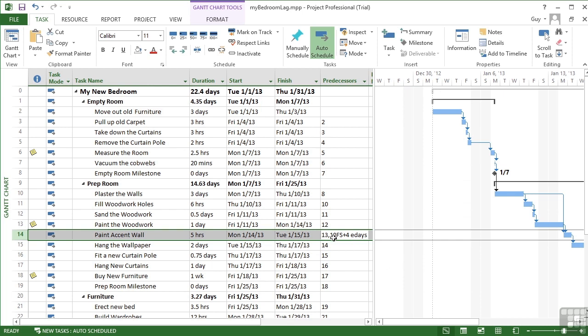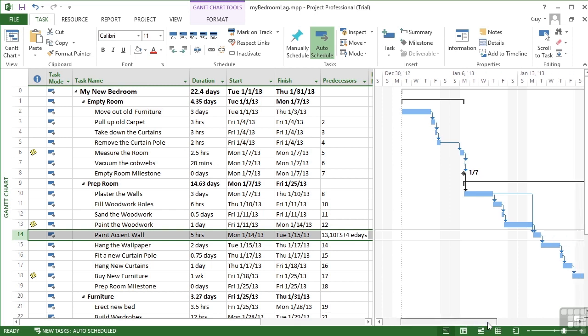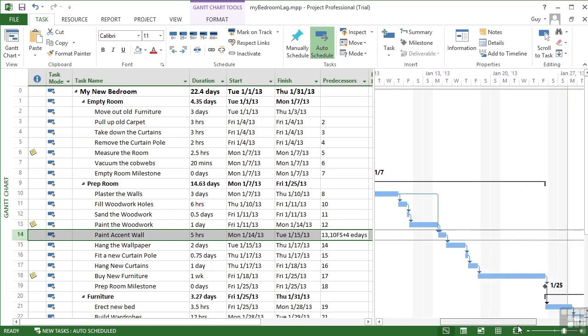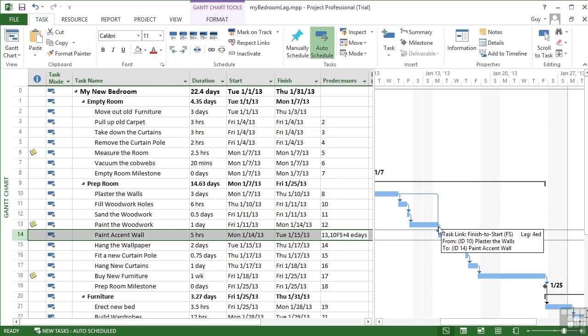Now you can see here that then gets entered as 10 FS plus 4 E days. Now previously I've said that FS does not appear in the links, but it does if you add a lag. And then in your Gantt chart, you can see there's our paint the accent walls and we can see the other join is here. And that hasn't made much of a knock on effect because of all the other things that are happening, plus a weekend in between that really allows that plaster to dry.